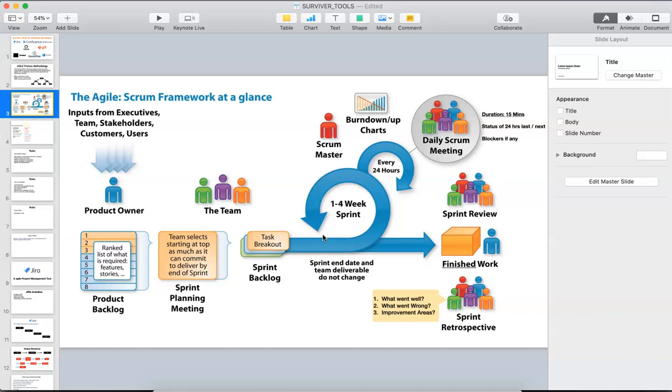Not only backlogs: once the first sprint is over and the development activity is done, the testing team also gets involved, starts testing, and will add bugs. Those bugs also need to be fixed in sprint 2. Whatever pending work there is will be carried forward to the next sprint. This is how the Agile methodology works in companies.